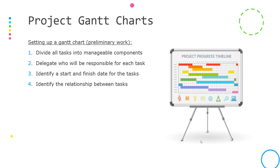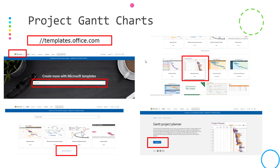Let's get into Gantt Charts. To simply set up a Gantt Chart, we need to do four things: divide all the tasks into components, delegate people responsible to these tasks, assign a start and finish date, and finally determine the relationship between these tasks. There is a set of simple Gantt Chart templates freely available from Microsoft Office. The website is templates.office.com, and in the search box we type Gantt Charts to find the template style that suits you and simply click and download.